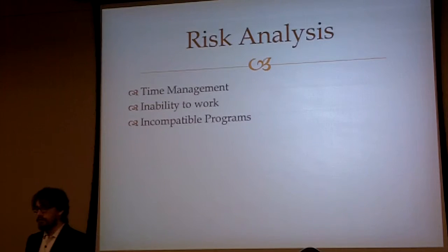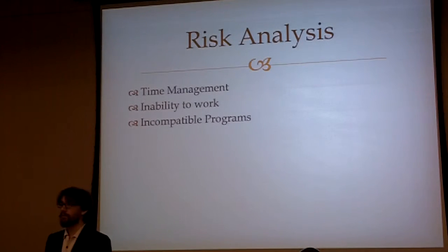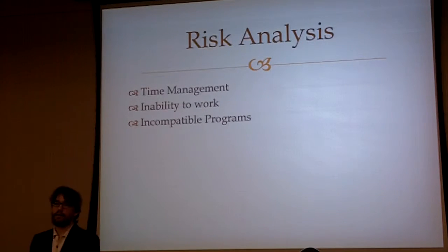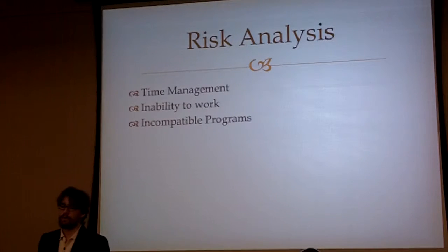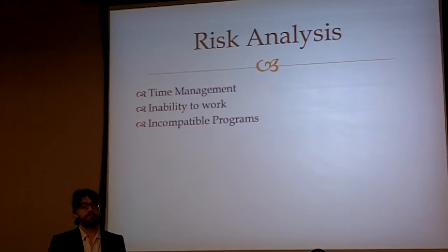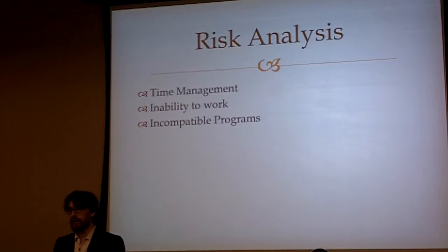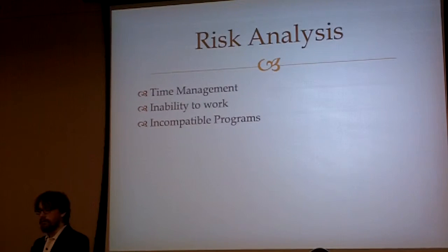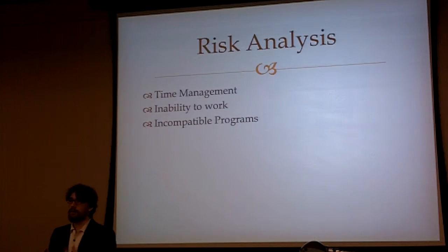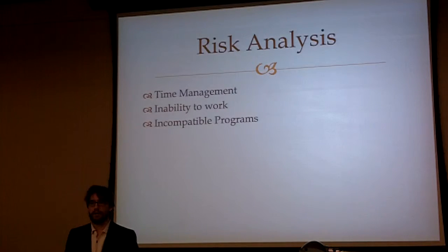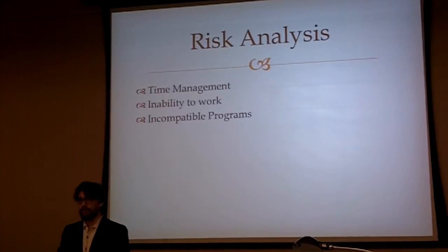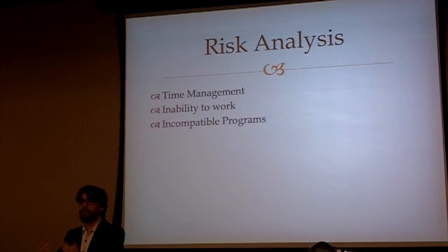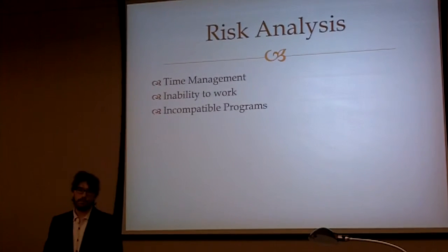We have determined 3 major risks to making our project fail: time management, missing a worker, and incompatibility with our programs. In order to prevent misuse of time, we have determined that we will set aside an hour each night to work on the program. This can either be working on the coding or the iteration report, whatever is needed to progress the program and project.